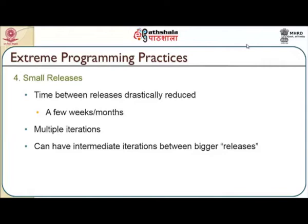After metaphors, we may have to look at small releases. Like every sprint, or once in 15 days, we may have to release a simple version of a product, so that it might be helpful for the customer to review what exactly has happened. The time between the releases drastically gets reduced, rather than talking about a 6-month or 1-year time span. This happens in multiple iterations, and there will be a lot of iterations that tune the entire work, since the active involvement of the customer also plays a vital role. It can have intermediate iterations between bigger releases.